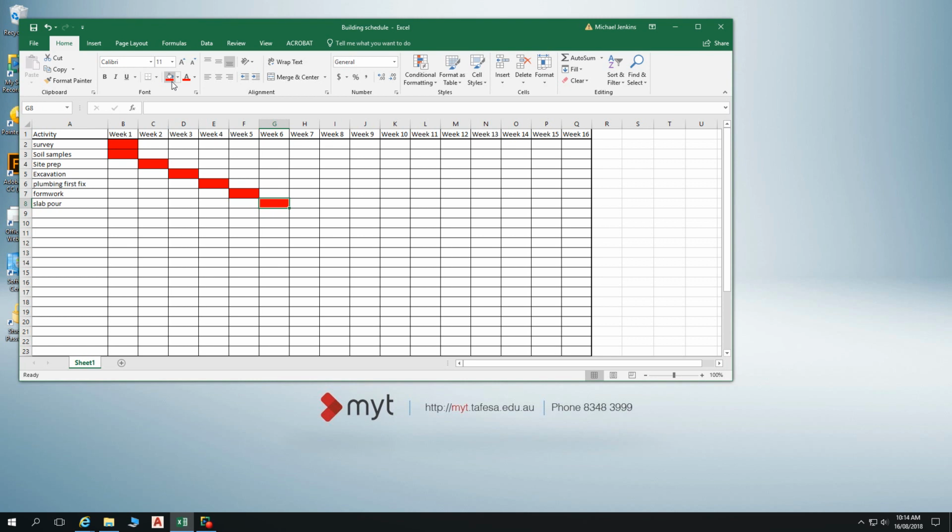So it should be around 8 to 10 days. Sometimes it happens after 5 or so. You've got to be very careful if you're pushing those boundaries, particularly if you're going to be fixing any of your bottom plate fixings into your concrete slab in that time period, because the concrete hardens and gains its designed strength at 28 days. So at 28 days, it meets the strength it's initially designed for.